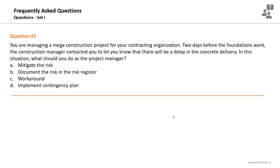Starting with Set 1, Question 1: You are managing a mega construction project. Two days before the foundations work, the construction manager contacted you to let you know that there will be a delay in the concrete delivery. In this situation, what should you do as the project manager? Options include: mitigate the risk, document the risk in the risk register, workaround, or implement a contingency plan.